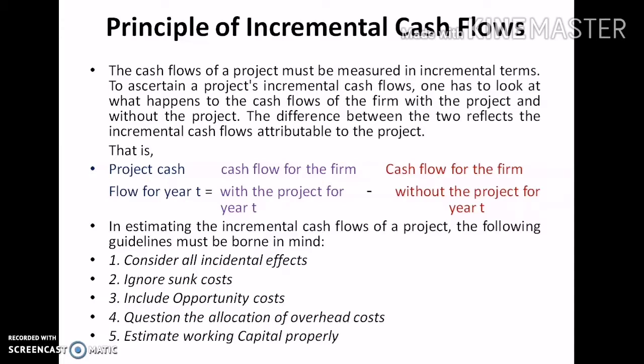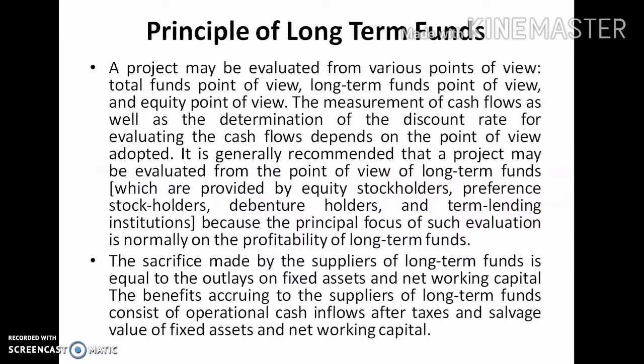Then next we move on to the next principle, the principle of long-term funds. A project may be evaluated from various points of view: total point of view, long-term funds point of view, and equity point of view. Therefore, the measurement of cash flows as well as the determination of the discount rate for evaluating the cash flows depends on the point of view adopted. It is generally recommended that the project be evaluated from the point of view of long-term funds, that is, the funds provided by equity stockholders, preference stockholders, debenture holders, and term lending institutions, etc. Because the principal focus of such evaluation is normally on the profitability of long-term funds.